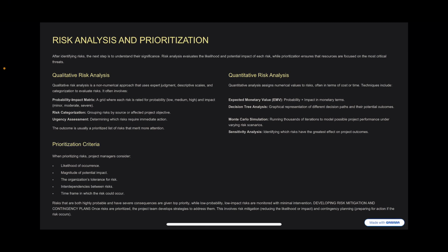Then we have the urgency assessment, which is very important. That's determining which risks require immediate action. What should I do immediately? Which risks need to be taken care of immediately? Now, the outcome is usually a prioritized list of risks that merit more attention.